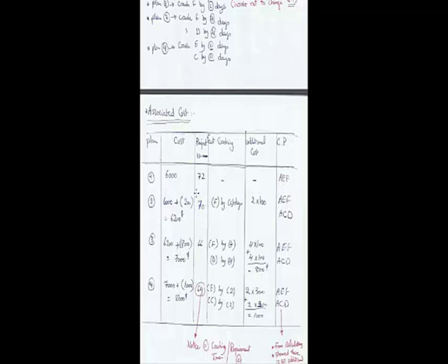And the number of days will decrease by, we have crashed F by 4 days, right, and D by 4 days also. And each additional cost per day equals 100 from F, and the number of days were 4, plus 4 days from activity D, and each additional cost per day equals 100. So the summation of both of them equals 800. So 6,200 plus 800 equals 7,000.